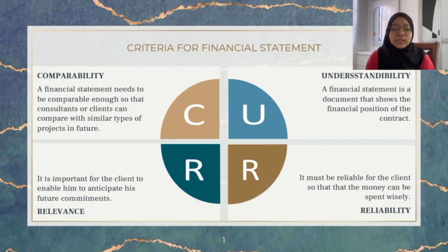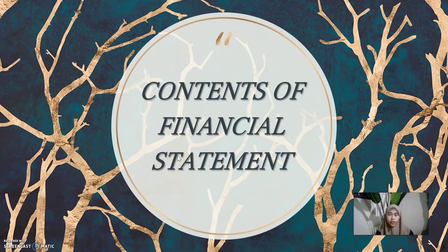The last but not least is relevance. A financial statement must be relevant and up to date for everyone to refer. It is important for the client to enable him to anticipate his future commitments. For example, a client may have to raise capital if there is a likely increase in construction costs, or he may instruct savings to keep costs within the budget. All in all, these decisions can be made if a financial statement is relevant. Alright, next we move to the contents of financial statement.